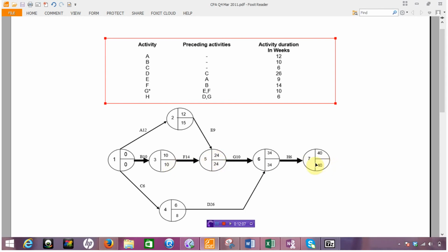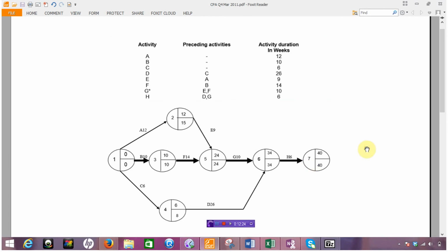And what you'll find is that the nodes where you have equal values, top and bottom, are the nodes of the critical path. You'll see that they outline it and highlight it within this diagram. So in terms of CPA, certainly practice is important. A couple of other issues with regard to the requirement I'll show you below in a moment, but in essence what we're looking to do is find the nodes where the values for EEL and LEL are the same, and you'll find that by simply adding back and going for the lowest values.